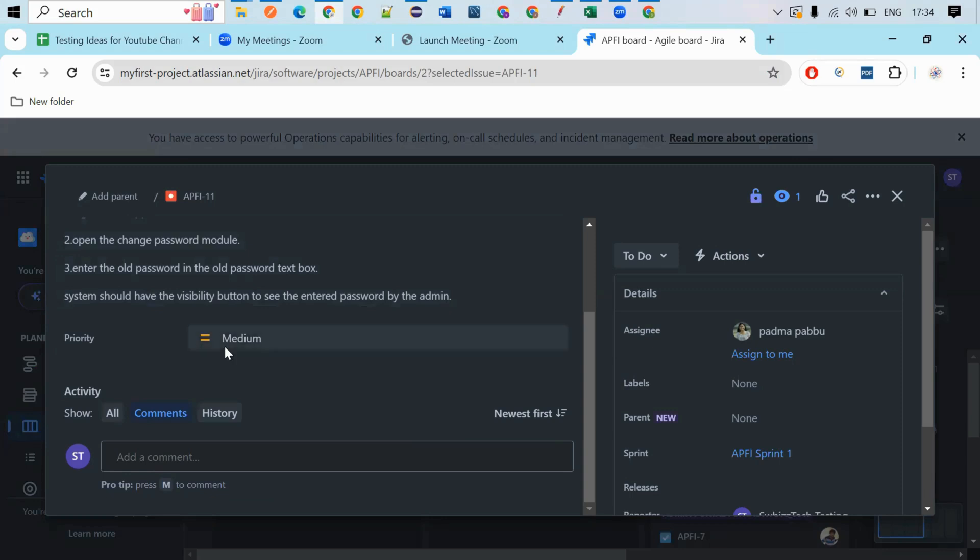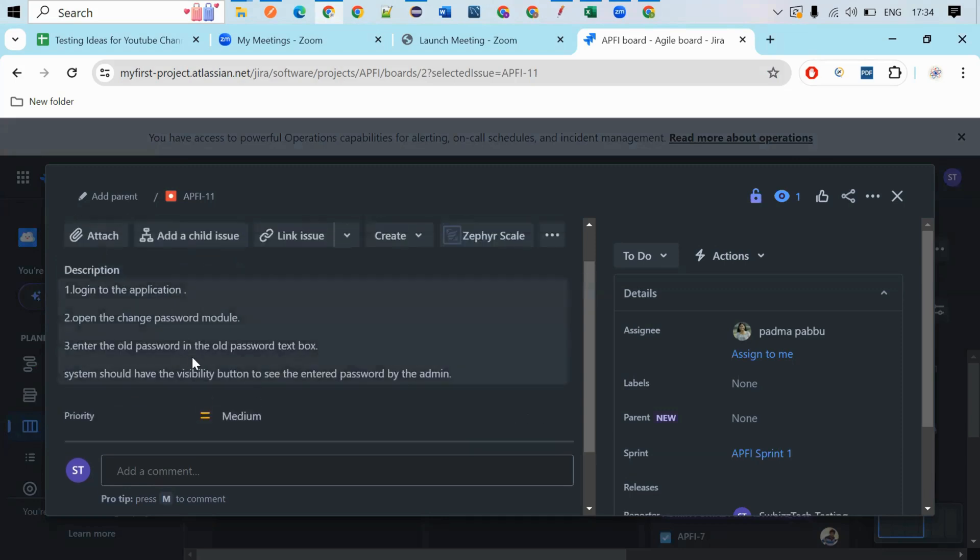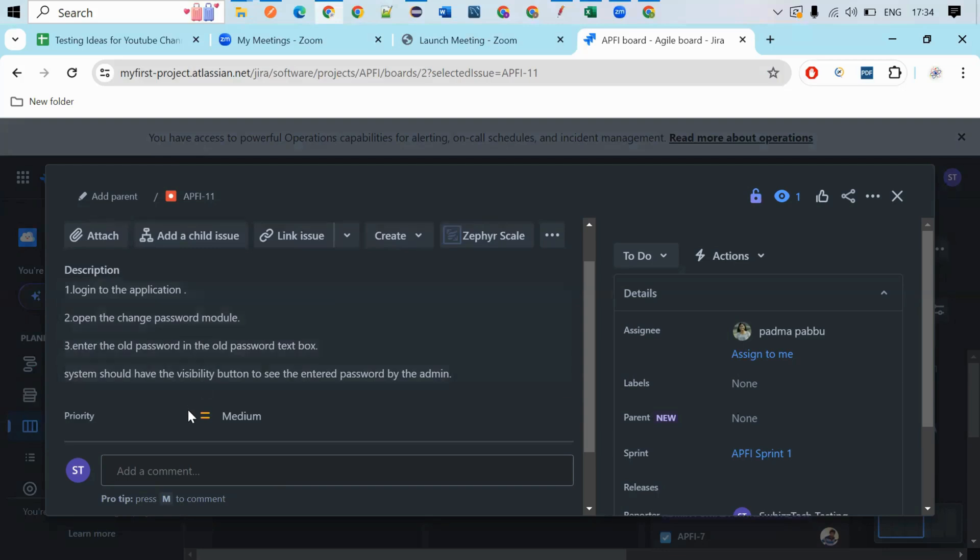So this is the priority I chose, medium. Medium because this is working as expected, but here I'm facing inconvenience with the application while using, but the model is working fine. So that's why I chose the priority as medium, not high.